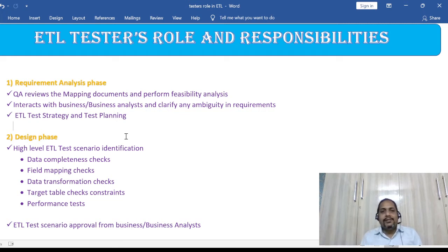The developer will start working on a particular requirement. Let's say he starts coding, and while the developer is coding, the tester will start writing the test cases. Once the developer releases the code for testing, the tester starts testing it, and the developer will pick up another story. A story is basically the requirement, right? He will pick up another story for coding, and at the same time the tester can write the test cases for that. So when the product is ready for testing, the tester can immediately pick it up and perform the testing.